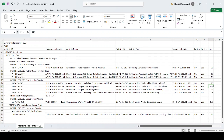The better approach is to remove the lag and replace it with an activity. For example, if procurement delivery takes four months, instead of putting a four-month lag, add a four-month duration activity. This way, every week as you update, the remaining delivery time reduces. With a lag tied to a baseline, you cannot change it, which can give a false impression of project delay.